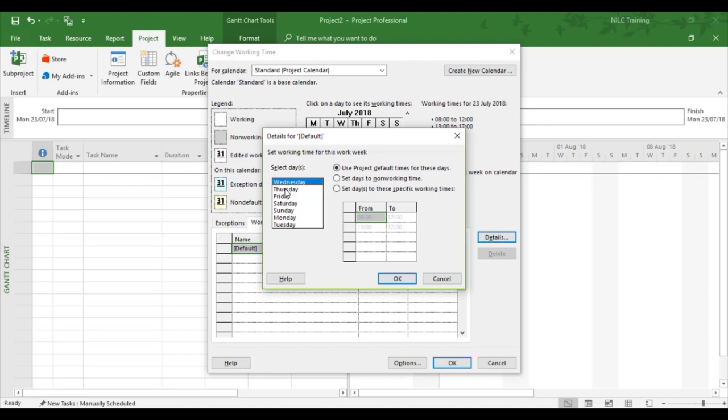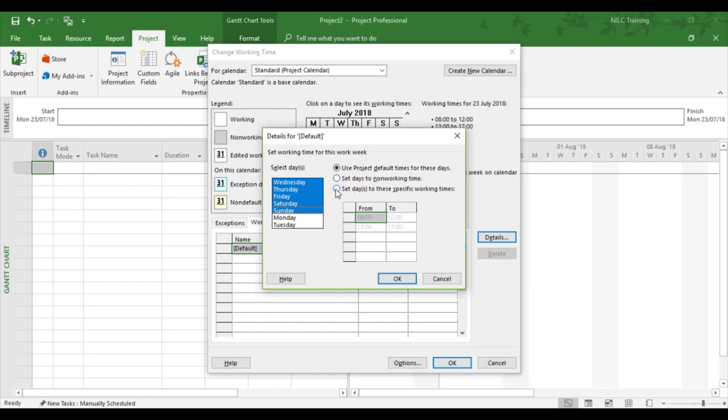And we can see now it's set itself to Wednesday because that's what we've changed in the schedule. So I'm going to highlight Wednesday to Sunday with my shift key. I'm going to choose the third option, set days to these specific working times.